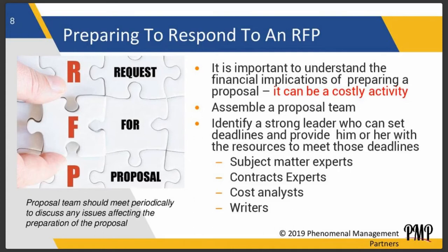Do you have to have a business development person? Do you have to pay that business development person? Is that business development person's cost going to be recuperated out of the award? Sometimes you have to eat that cost. And you have to understand that it's the cost of doing business. Also, when you assemble a team, you may have to hire a program manager. Program managers are usually billed direct to the contract, but what if you don't get the contract? You spent money and you've spent time on getting a program manager that you may have to, at the end of the proposal, fire.